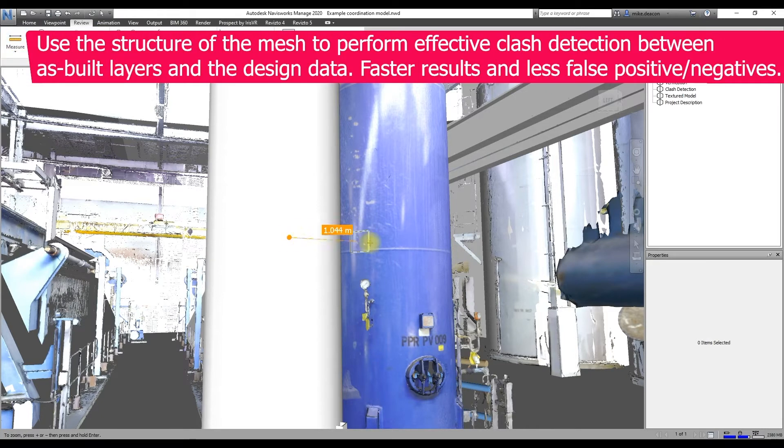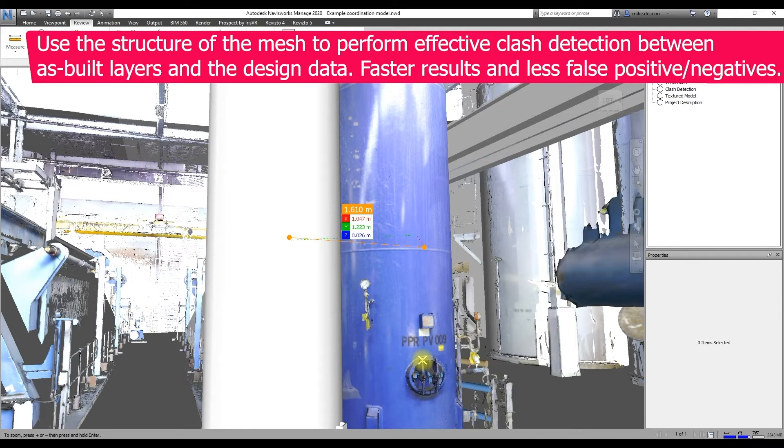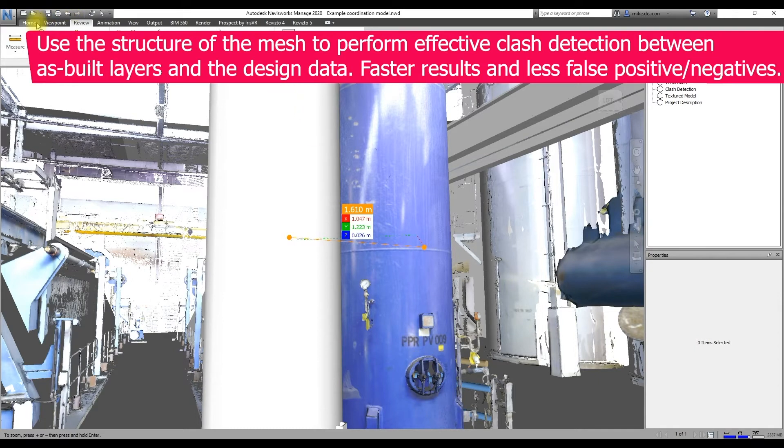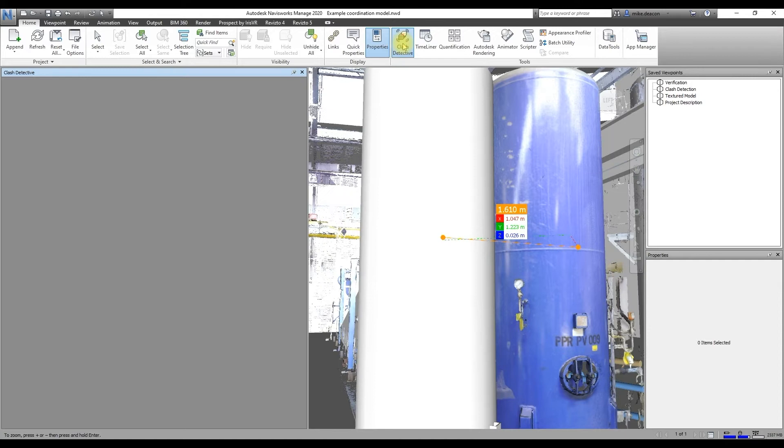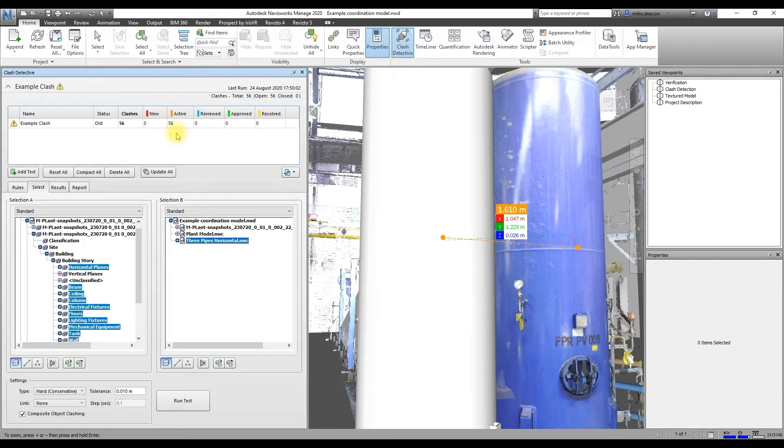So just as an example here, measuring the distance between that design tank and the as-built tank, so we know that there's an issue there that's going to need to be resolved in that design data.